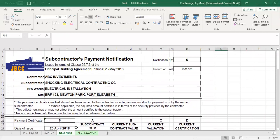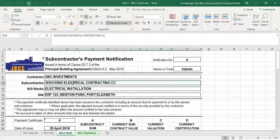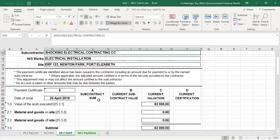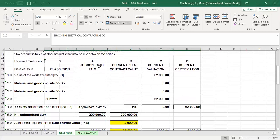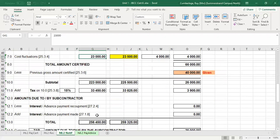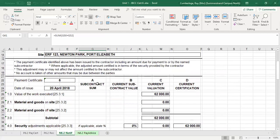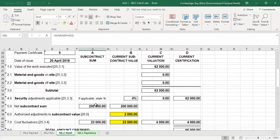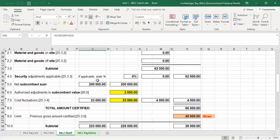Then we look at the last two certificates relating to the nominated subcontractor. In this case there was only one — the electrical contractor, referred to as Mr. Shocking Electrical Contractor. All dates are the same. For the contract sum column, remember the provisional amount allowed in the bill was 200,000 rand. The estimated escalation based on that value is 23,000 rand. Adding VAT gives the contract sum. These values also remain fixed from certificate one right up to the final certificate.